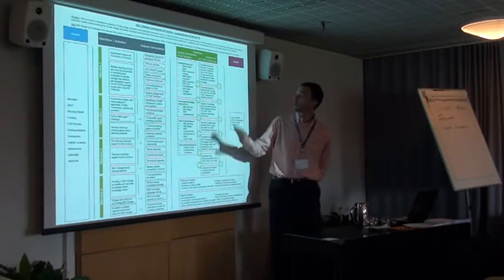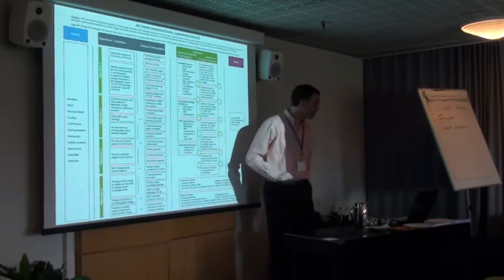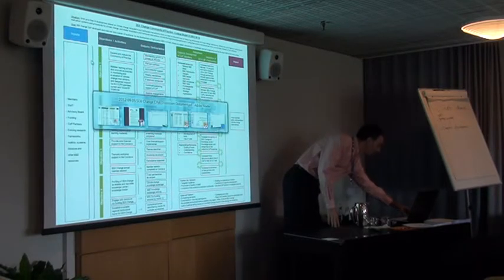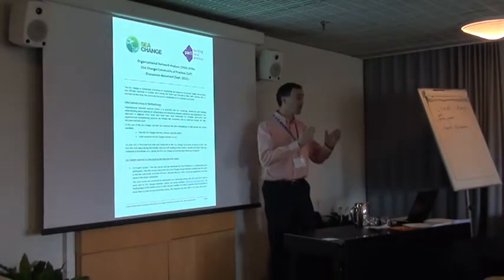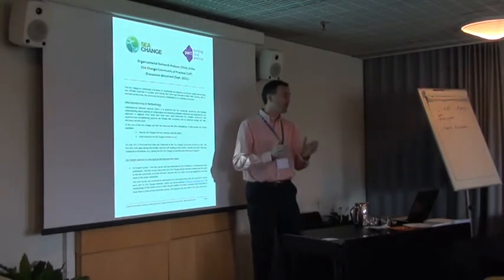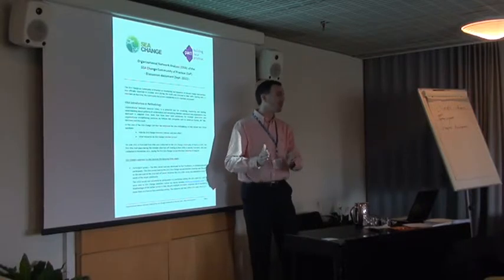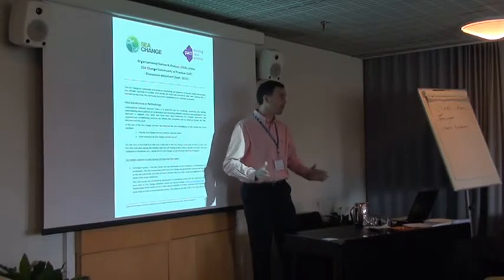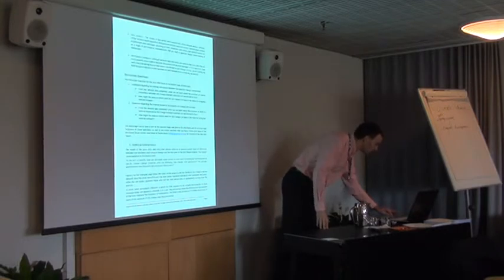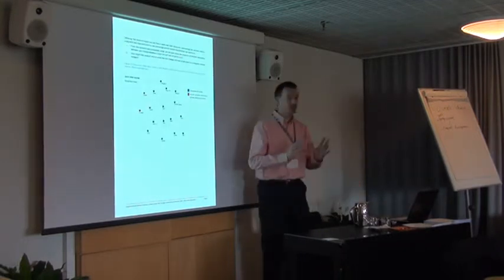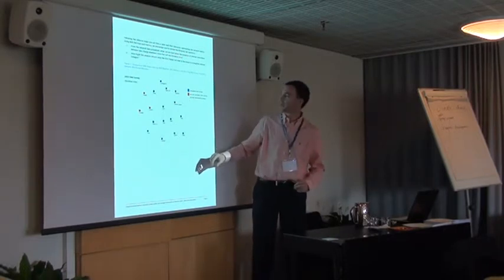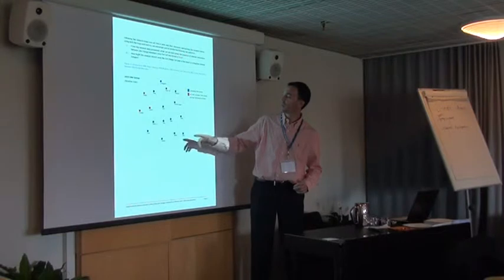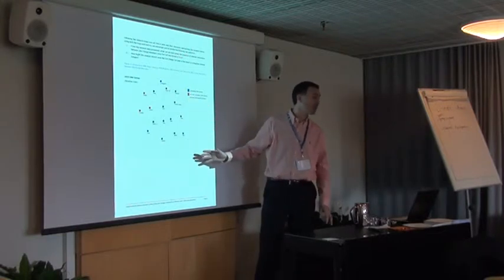There is one point with respect to the outcomes that we look at the moment, and that is called an organizational network analysis, which we did as a baseline, which we did midterm, and which we did at the end of the grant period. And I'll quickly scroll through it. So what it does, it shows interaction between our members. And for example, here you have the baseline where these were all the members at the moment of the baseline, which were 17 members.